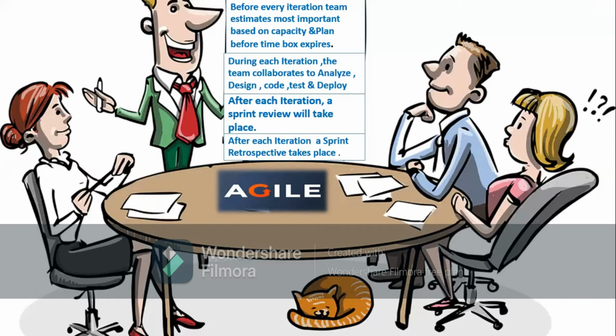Now the sprint review takes a half day, and the other half day, within the 2 to 4 weeks, is set for a sprint retrospective. A sprint retrospective is the way you capture lessons learned on how to improve your process, and recommend the actions to be taken for the next iteration delivery. So that's what we call a retrospective.